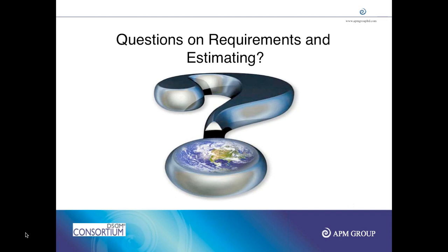So requirements, let me just quickly summarize. Requirements in agile projects should never be pinned down in the beginning. At the time of feasibility, we should know the high level requirements and note them, around 8 to 10 high level requirements. Then when we go into foundations, using the business stakeholders, we break them down into about 80 or 100 requirements. These are all user stories. They are all documented in the prioritized requirement list, and they are ranked using MoSCoW. And then we baseline the requirements.